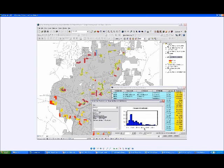It shows us the frequency distribution of tonnages by facility ID, but more important was the total tonnage in the geographic area. So this particular selection set had 18,373 tons of surface course, which was our basis for doing the shuffling. And what we did is we broke the city into these geospatial areas, created selection sets, looked at the total tonnage in the area, and then assigned them to either one contractor or the other.